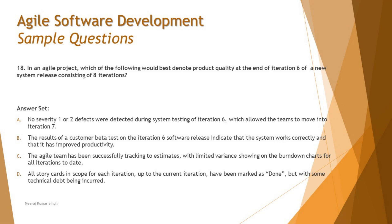Option B is the best possible answer to define quality is up to the mark. Option C says: the agile team has been successfully tracking to estimates with limited variance on burn-down charts for all iterations to date. This is more from a scheduling and effort estimation perspective and doesn't talk about product quality. You can estimate work accurately while accumulating technical debt — it indicates team velocity but not product quality.